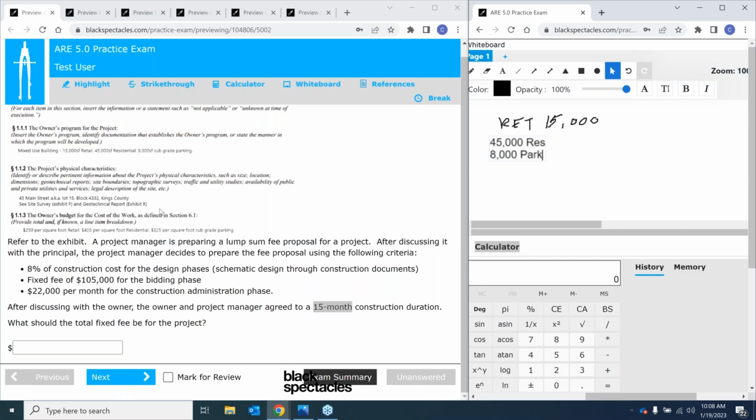So for me, I know based on the question, I don't need to know anything about the address. A time and address would be important in a question like this if we had a location cost multiplier, which is fairly typical in construction. So let's say we were being told this is in Des Moines, Iowa, and it has a cost inflation of 1.6. That's when the address would start to get important to us. But for this, it's just some extra information that we have.